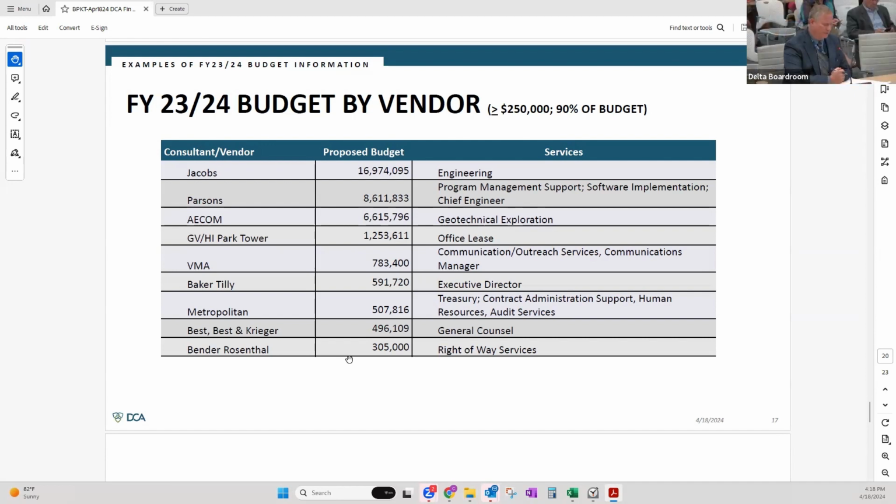One thing, when we were doing the design or the EDM, innovation was a scoring factor. We had a number of firms present ideas that they had. One example was one firm suggested adding 2 or 3 additional TBMs to the project. That way you could finish your project schedule maybe another 3 or 4 years in advance, shaving off the schedule and saving about $1 to $2 billion. So yes, you can add those kinds of quantitative items to the RFPs or requests for qualifications that you're going to be doing. That could save you a considerable amount of money and time.